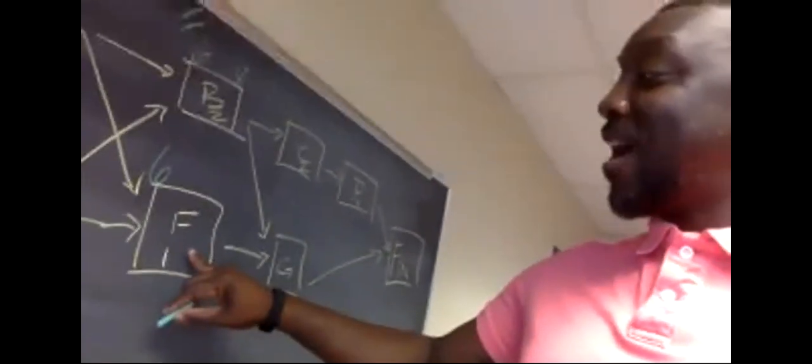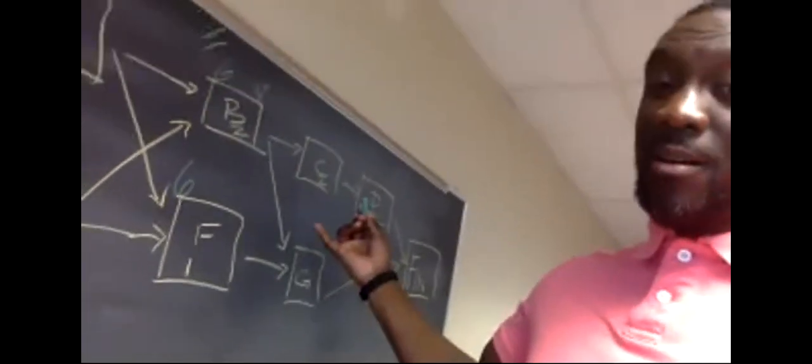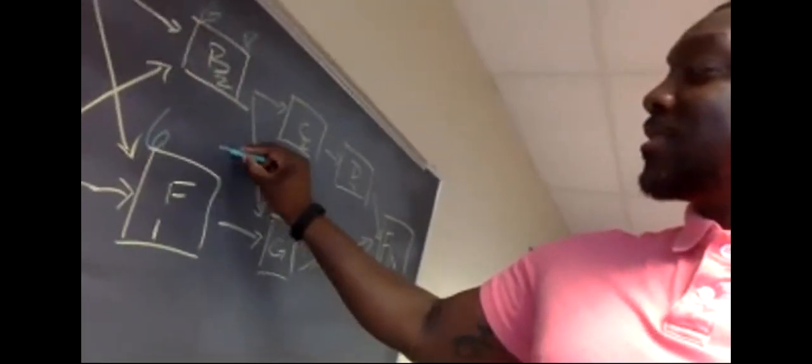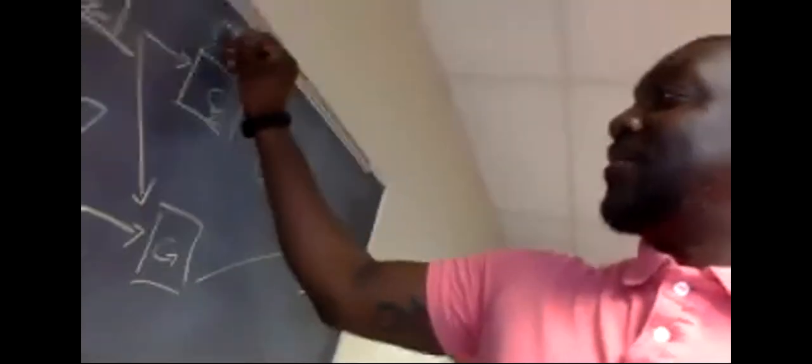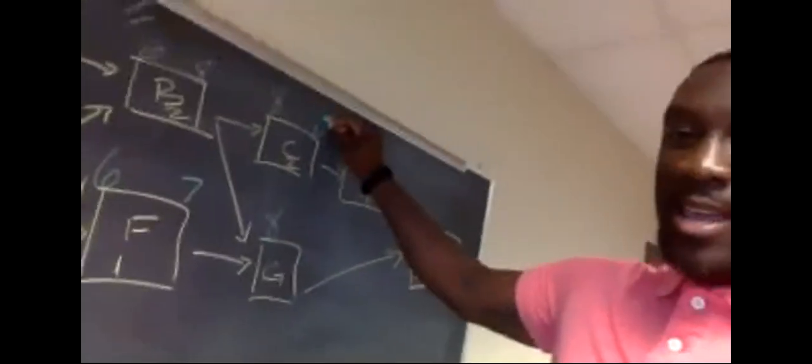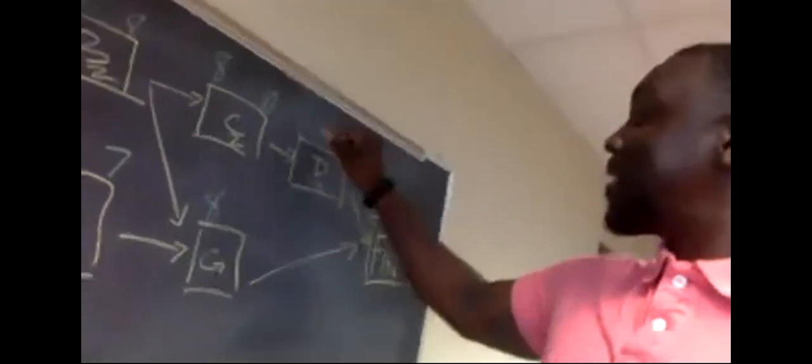So then I can also bring my 6 down to F, right? Because I got a 6. That's my number. 6 plus 1 is? 7. So I got a 7 and an 8. Which one do I go with? 8. Very good. I bring my 8 and my 8, right? 8 plus 2, 10 for C. I bring my 10 over.